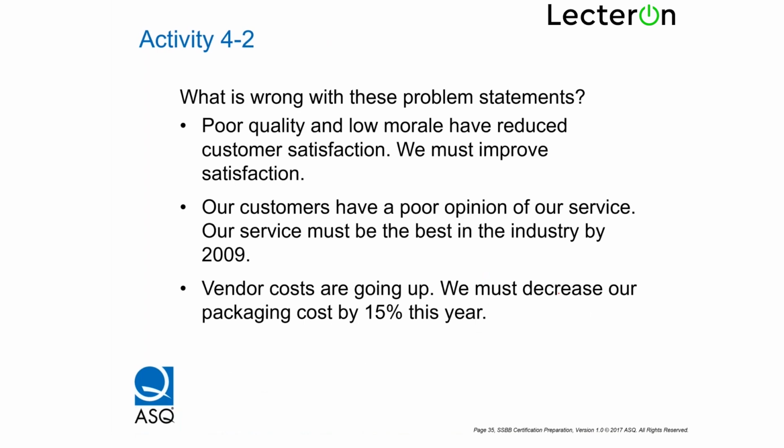So look at these problem statements and tell me what's wrong. Poor quality and low morale have reduced customer satisfaction. We must improve satisfaction. What's wrong in this? There you're already assuming what the causes are. Yeah. What else? Like saying poor quality and low morale. Yeah. What else? You're also saying that your customers have a poor opinion. So basically, you already know what you're referring to without actually doing the analysis.